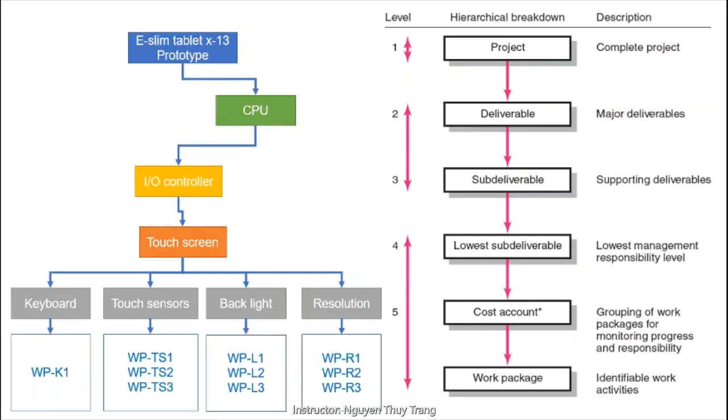The lowest level of the WBS is called a work package. Work packages are short-duration tasks that have a definite start and stop point, consume resources, and represent cost. Each work package is a control point. Practice suggests that a work package should not exceed 10 work days or 1 reporting period. A work package of the WBS should be as independent of other packages of the project as possible.